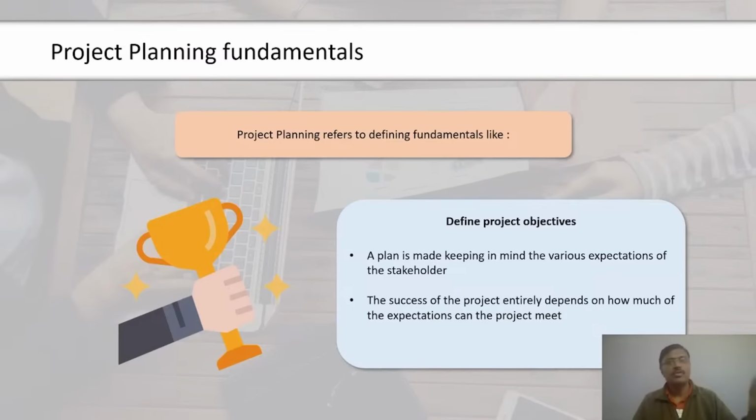The second category is the cost of non-performance. It is money spent during and after the project because of failures. This is subdivided into internal failure costs. It is the cost of failures that occur before the product is released to customers, for example, rework and scrap. The second subdivision is external failure costs. It is cost incurred on failures that occur after it has been released by the team, for example, liabilities, warranty work, and lost business.